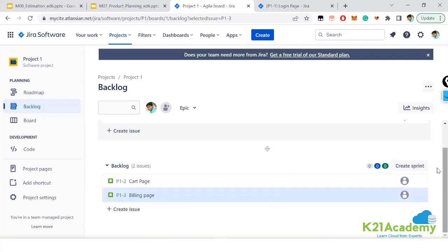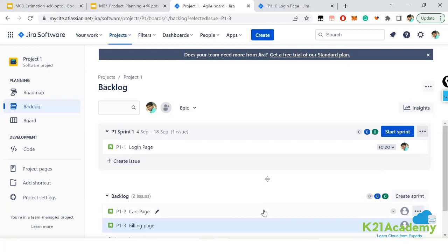And along with this, in the sprint planning session, whatever items you believe the team is going to commit to or wants to work on, once we have clarity, we will just drag and put them in the respective sprint. And the moment we click on start sprint, only then are we going to commit. Otherwise, we are not going to commit until then. Even though it is there, the commitment has not been done. We have planned it, but we have not committed yet because our sprint has not started.